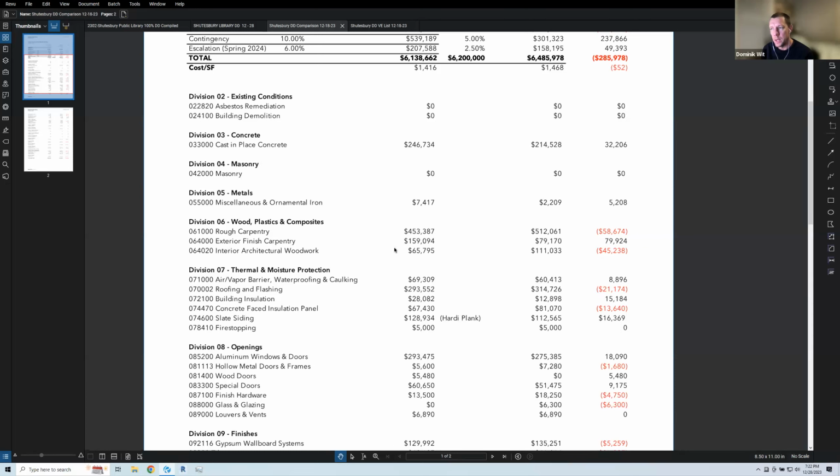I think it's something we can investigate and see some savings, so I'm projecting into CDs that we might be able to take some of this $45,000 down. The DD set was probably more detailed than what we usually include, and it had the kitchenette, the circulation desk, the self-checkout, and a bunch of components there, some countertops throughout the library. So that's really what that number is.